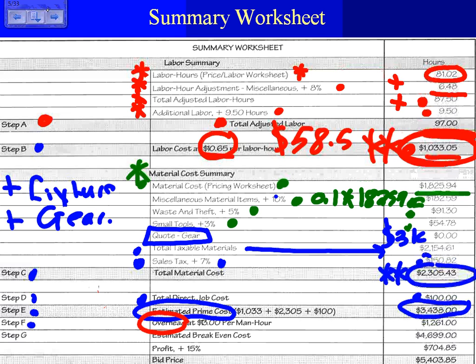So here's a 10.65. Now my labor costs more than that because I need to manage it. What's overhead? Overhead is the cost of managing the job. So I'm bidding the job for, what is it, 23, yeah, 23.50, 23.7. If you add this value, 13 to 10, the $23 is what actually they're bidding the job, because of the overhead.